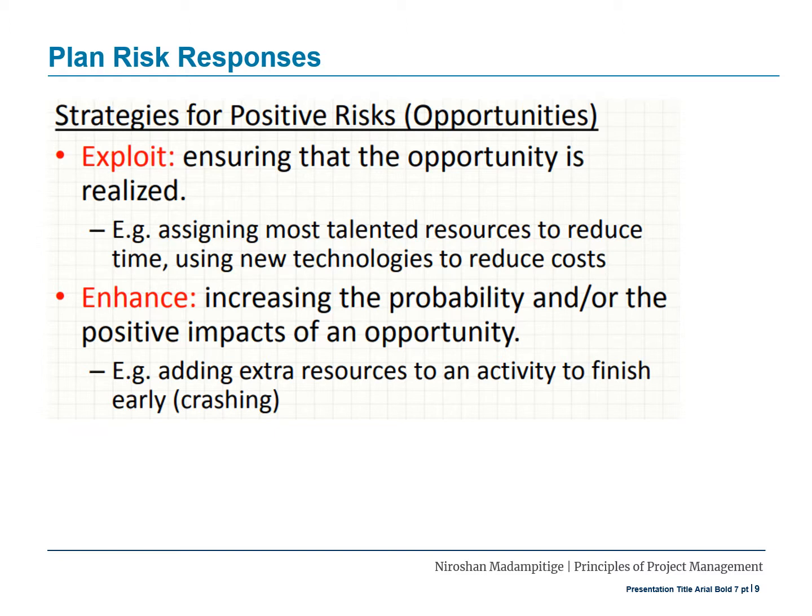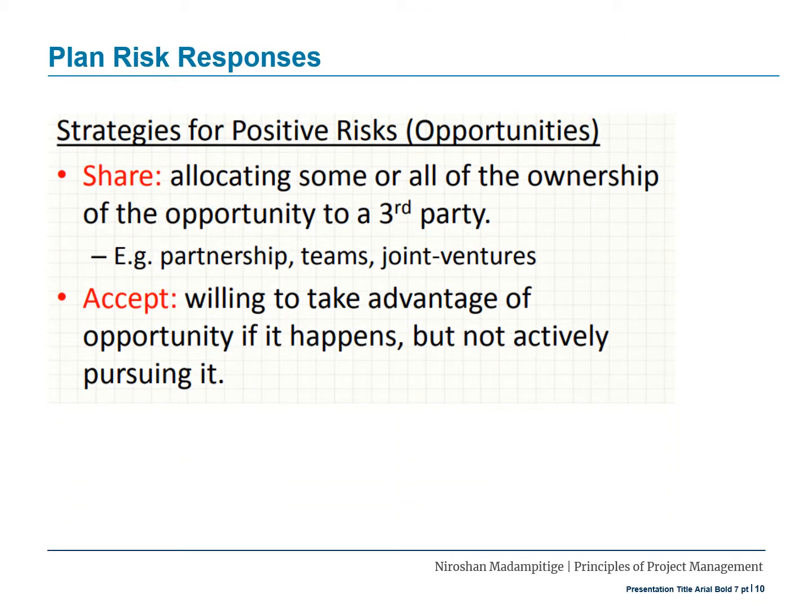Enhance. Increasing the probability and the positive impact of an opportunity is known as enhancing. Example, adding extra resources to an activity to finish early, which is also known as crashing. Share is another response to a positive risk.